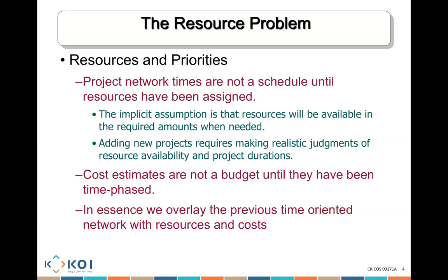To do it correctly, you need to know who am I allocating to that task? How many resources do I have? If you have enough resources to allocate to a specific activity on a network diagram, then that's a proper schedule. If not, then the schedule on your network diagram needs to be pushed because you do not have enough resources.